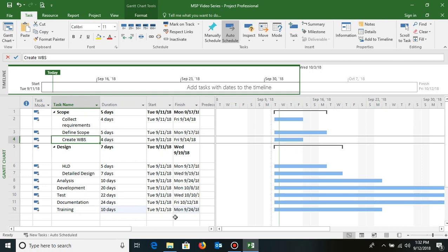Then I can have activities in a finish to finish relationship. Finish to finish typically means that the predecessor has to finish, then only the successor can finish. The successor can finish on the same day or after certain days. Let's say I have activities like testing and documentation of the test results. They can run parallelly, but documentation can only finish once the entire testing is complete. In fact, documentation might take one or two days more to finish compared to the testing, because I might have to compile the reports in the proper format in which my other stakeholders might need it. So testing and documentation can have a finish to finish relationship.